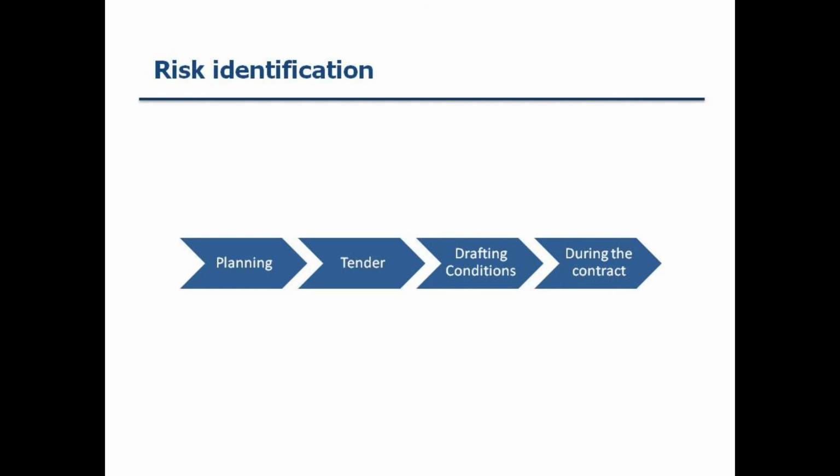On the other side, there's administrative risks. So issues associated with statutory requirements to provide a safe workplace, inspections required under regulatory requirements, and risks associated with funding to the project, interfacing staff and working together. There's a number of different risks that need to be identified at each stage.